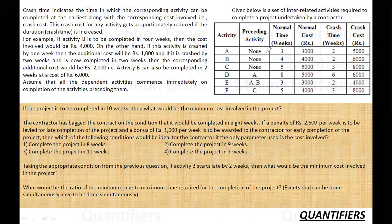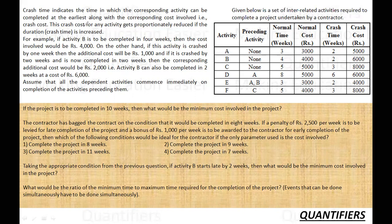There's a box showing interrelated activities required to complete a project undertaken by a contractor. The contractor has activities A, B, C, D, E, F, and so on. Crash time indicates the time in which the corresponding activity can be completed at the earliest, along with the corresponding cost. For example, activity A can normally be done in 3 weeks but the crash time is 2 weeks, and the cost increases from 3,000 to 5,000. Activity B can be completed in 4 weeks at 4,000, and if crashed by 2 weeks, the additional cost is 2,000.